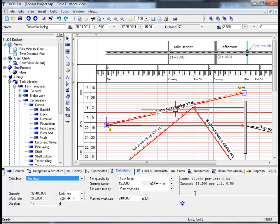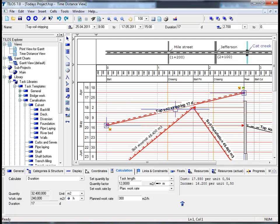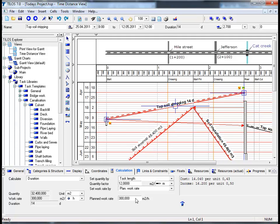Now the question we need to ask ourselves is: what do we need to do to optimize our income? What do we need to do to earn money as opposed to losing money? If we go to the planned work rate field and change this to 300 square meters per hour and hit the return button, we can now see that we have a different cost structure. Our income remains the same; however, instead of losing 1,350 euros as we were a moment ago, we are now making money based on this calculation model.